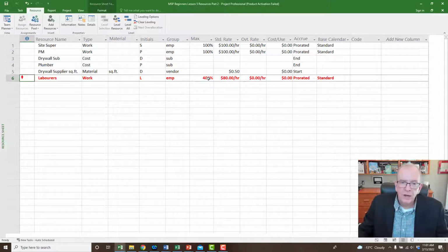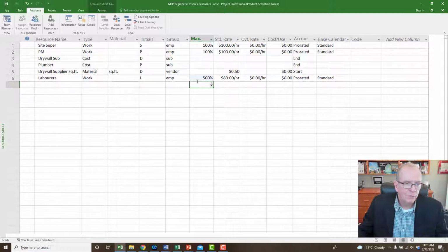Now, if I have another one available, or I can get one part-time for something, I could change that and say, that's okay, we've got 5 available, and it goes away. It won't be over-allocated anymore. If I'm going to leave this at 400%, it tells me that, yes, I've assigned too much.